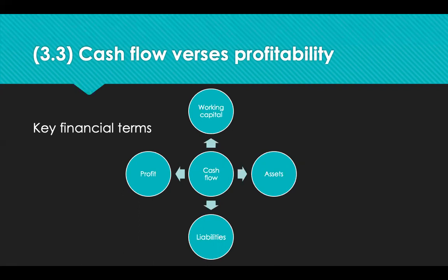The strategies you can adopt will include controlling capital funds within the scope of the project or the contract so that all transactions are completed within the set budget, or vetting your suppliers to ensure their competence and capability to complete their role, and allocating sufficient funds to ensure that no key supplier or subcontractor suffers from cash flow problems during the project.